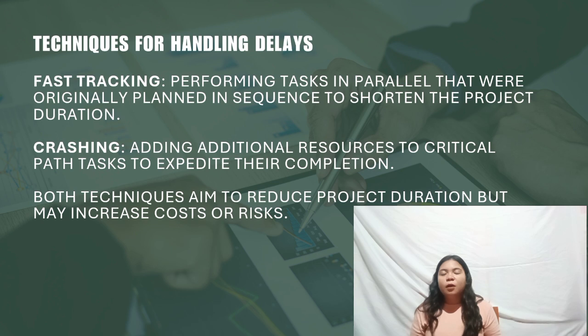But there are also pros and cons of this. The pros are no additional cost in resources and it can significantly reduce time if tasks are compatible. But the cons are it increases the risk of rework if overlapping tasks interfere, and may cause quality issues or coordination challenges.